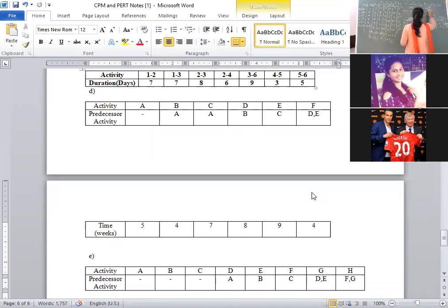Similarly, for node 3, that is 13 minus 9, it's 4. Next, for node 4, slack value L4 minus E4, that is 12 minus 12, 0. For node 5, slack value is L5 minus E5, that is 21 minus 21, 0. For node 6, the slack value is L6 minus E6, that is 25 minus 25, it's 0.